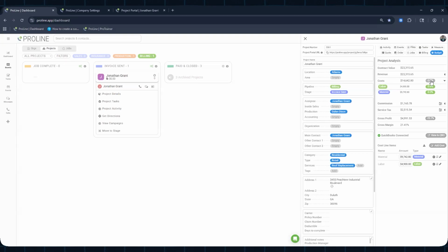Just to explain a bit more of the percentage. If you click here, when you signed a quote, it would show you what your costs were going to be based off, let's say 14,000. You did not incur any additional cost for this job. So it's staying at 0%, which is actually good. That means that I'm actually on par with what I had planned for this job. But obviously, in reality, it could be possible that you had to buy additional materials, and this can change. So currently, it shows to be at 0.